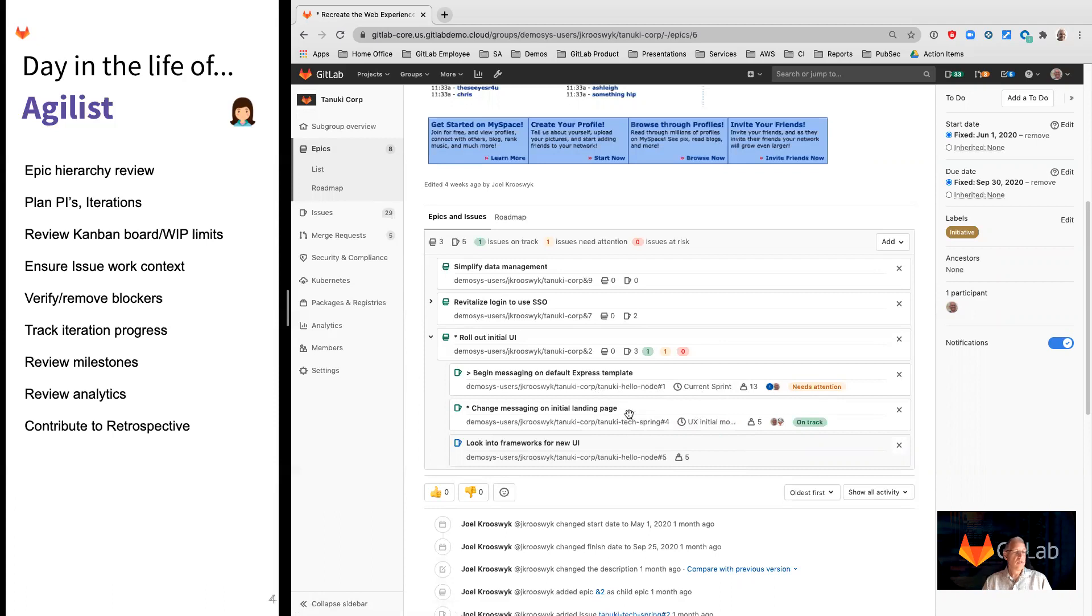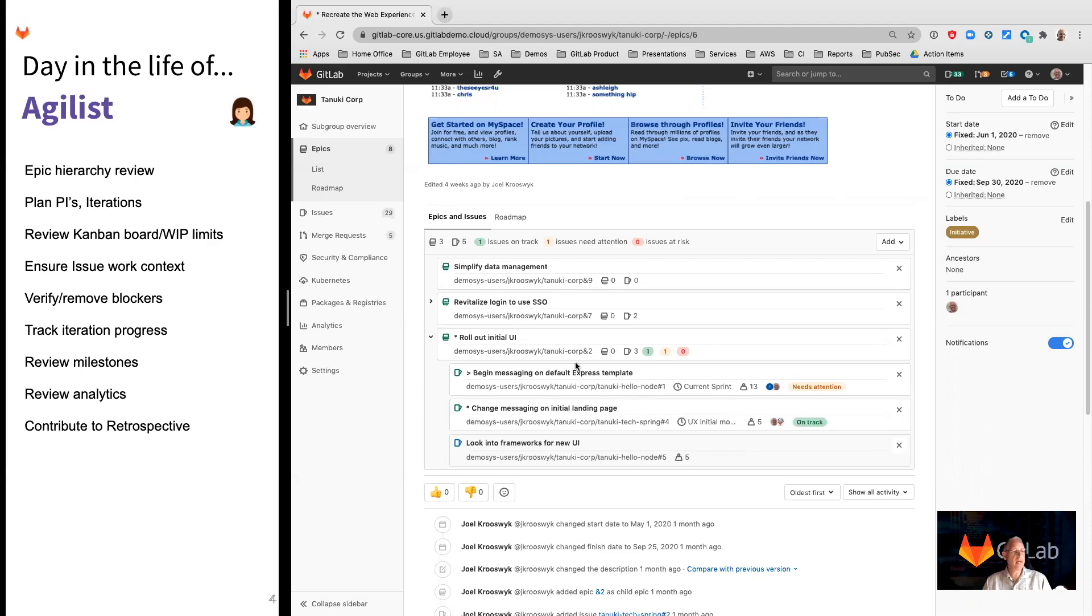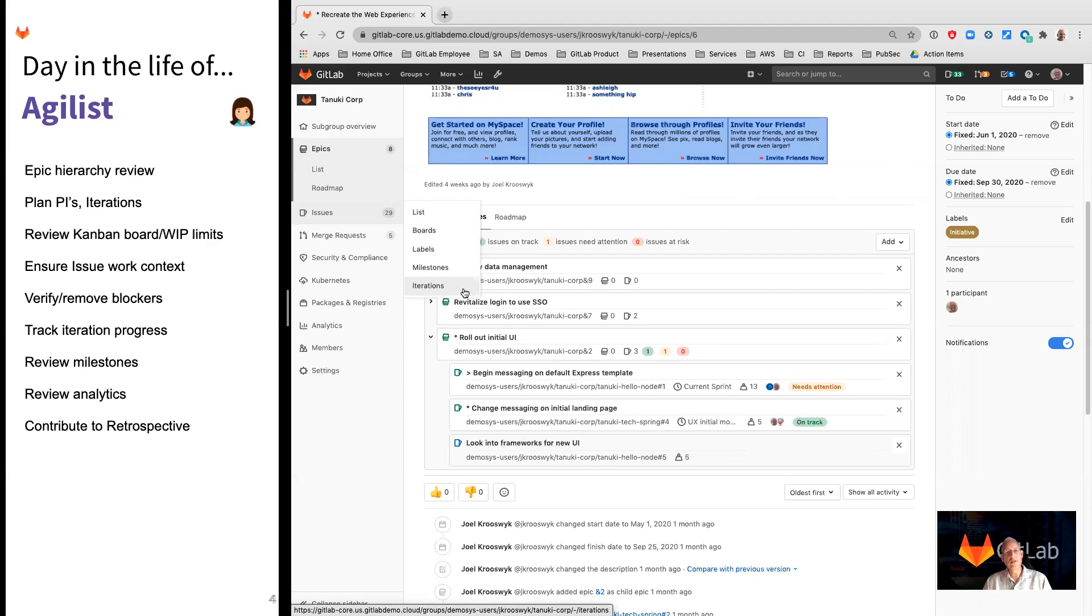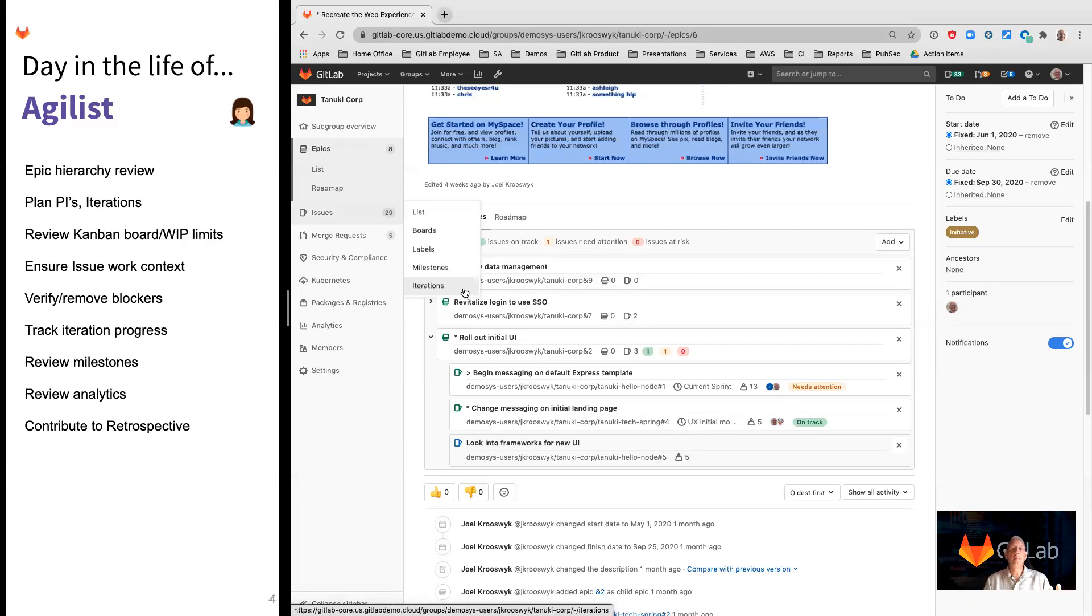When we scroll down, you'll see here that there are child epics that are part of this, and if I expand those out underneath that, we get into issues. Now what's important about this view is the roll-up of data. You can see here we've got a gut check, red, amber, green type of feel to what the feature health is that rolls up from the issues below it.